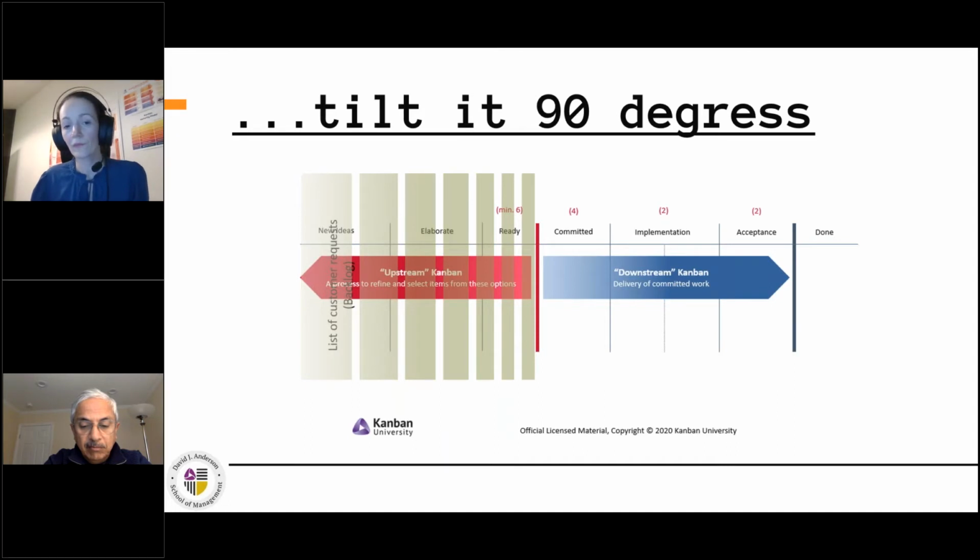On the other hand, you want to have the maximum limit because imagine you come into the pizza restaurant, you open the menu, and this menu has 20 pages, and on each page you have 10 items. So you have 200 items, and after half an hour, the waiter comes to you and says, can we take your order, sir? And you say, actually, no, I'm just at page 10 and still 10 to go. So you don't want to have too many items in your system. You don't want to overload your system. This is similar to the downstream: you want to avoid overburdening, also in upstream. So establish minimum and maximum limits.